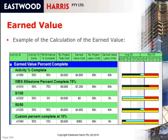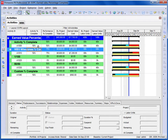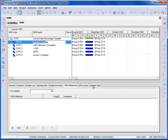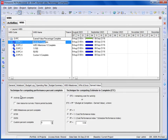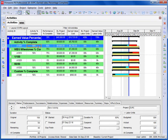In this picture you can see a program with five WBS nodes, each node having a single activity, and each node using a different technique for calculating the Performance Percent Complete. The first one is Activity Percent Complete. If you go to the WBS node you can see that the Earned Value is calculated based on Activity Percent Complete, and therefore changing the Activity Percent Complete will change the WBS activity's Performance Percent Complete.